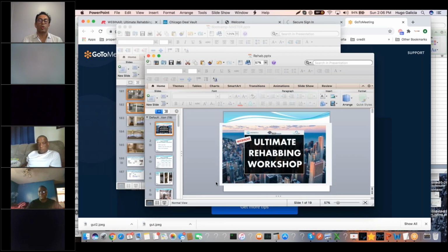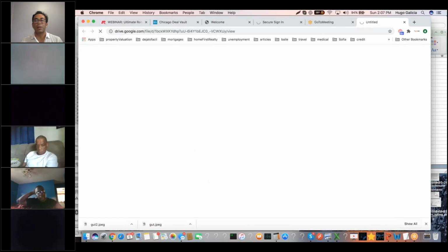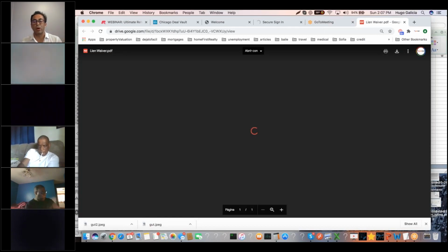When dealing with contractors, you have to have them sign a lien waiver once they complete the work. Phil, on the chat, can you please share with the audience the lien waiver? Awesome. Thank you, Phil. So I'm going to open this up. It's a document that is a must. Many people forget to do this, but it's critical. Not only are hard money lenders or private money lenders going to ask you for this.